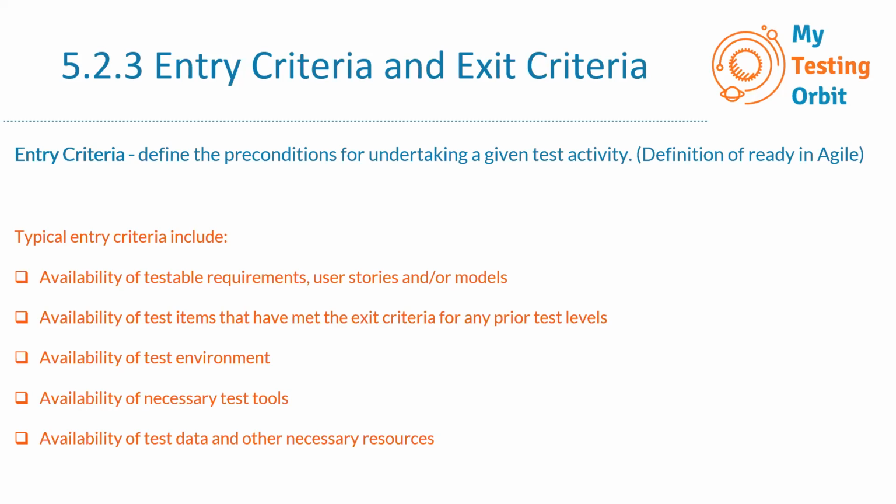So these are any preconditions which should be there before you start any kind of test activity. These are some typical entry criteria; they can be much more than this as well. They can be customized as per the requirements of different test activities, but more common are these. First of all, availability of testable requirements, user stories or models. Of course, if you have to design test cases or execute test cases, there should be requirements which are testable. What are testable requirements? We covered it earlier.